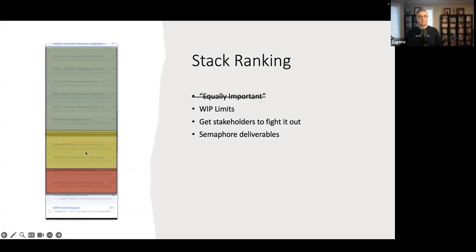So what I mean by that is, that screenshot that you see here, the green, yellow, and red, is essentially a screenshot from my team's actual board. That's why it's blurred. But you can see there are several stories here that are color-coded green, several yellow, and like 1 red. And what that basically means is, if I look 3 months ahead, the green ones are the ones I feel confident in delivering within these next 3 months. The yellow ones, I think I should be able to deliver if the green ones don't wind up being extra complicated or if nothing changes, and so on. And then the red ones are the ones that I probably will not deliver unless some miracle happens and these other ones become much simpler than I expect.